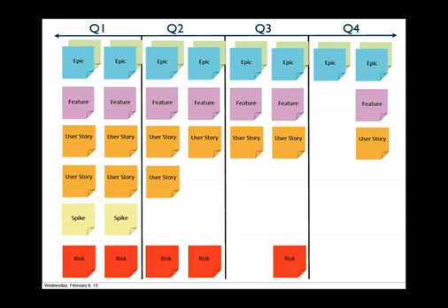Epics and features and user stories still meet the INVEST criteria. They're still contained. We're still minimizing dependencies. We're still doing all the stuff that we would do with user stories. We just want to understand them just a little further ahead so we can start exercising this notion of pulling risk into earlier releases to stabilize the future releases.